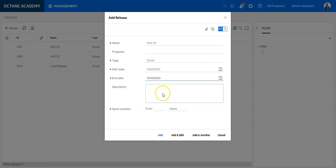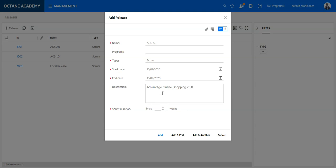Here I can provide additional information about the release—let's say it's Advantage Online Shopping Version 3—and specify when a new sprint should occur. I would say every two weeks we have a new sprint.